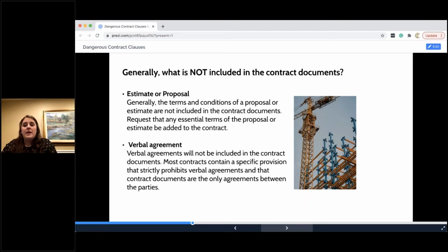Sometimes it's super vague. An example I can give is I had a client and it just said all fire rated glass. Great, that's what my client does. They can get them, they can install them, great. However, the problem was the scope said all. So what did all mean? My client interpreted all as the bid, and the bid was for 12 pieces. That price was for 12 pieces, it was great.